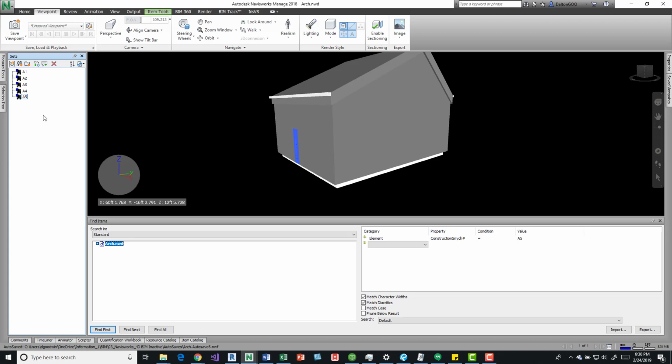But one nice thing is if you do apply a type of standard for your schedules, you can come into Navisworks and apply your search sets to what your schedule IDs would typically be. So A1, A2, for example, is all the architectural elements, S1 is all your structural, whatever the sequencing is. Have a standard, and then you can apply this within Navisworks, and use your search sets, which can all be saved within your Navis template.